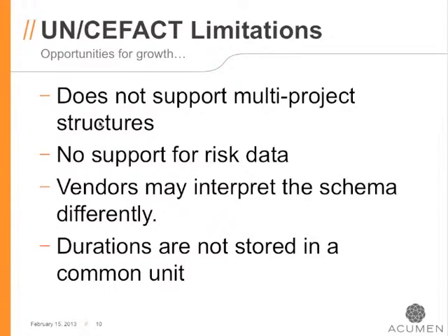First, the format natively doesn't support multi-project structures. Multi-project structures are something that I've seen used more and more. The popular scheduling tools support multi-project structures. Government is asking industry, with the way that they are sending contracts out for bid, they're encouraging different companies to become team members and work together, and that often results in large, sometimes complex multi-project structures. CEFACT, by its nature right now, is oriented towards single projects. So I see an opportunity for growth in the format there.